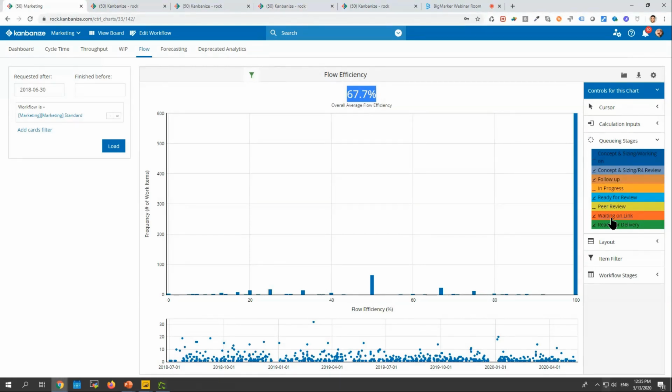Of course, I can't promise you that because I don't know what you guys do and what work items we have. But if you have flow efficiency below 20%, there's a very good chance that you can improve that without harming your throughput.